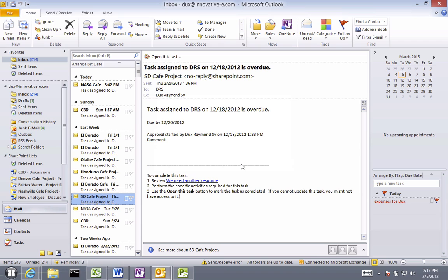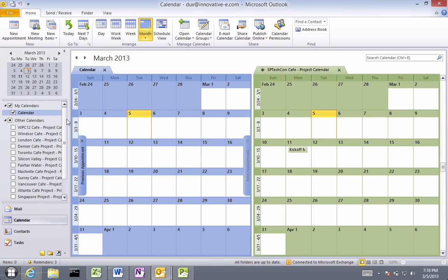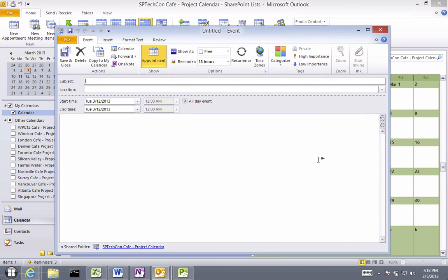So now what I just did is I took my project calendar and connected it to Outlook. And again, this is nothing new. This has been there since 2007, some of it 2003. So now, anytime there's data that's added to the project calendar, it shows up in Outlook. And I don't know about you, first thing I turn on when I go to work is Outlook. I leave it on my third monitor. It's right there. And that's how your users are. So I see all the calendar entries, but I can enter it from here as well.